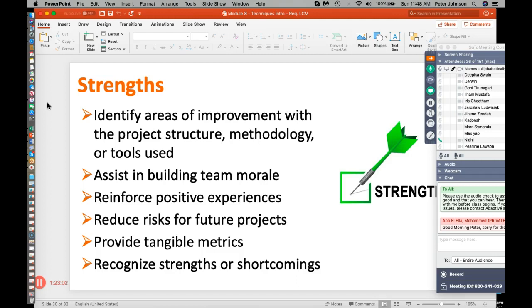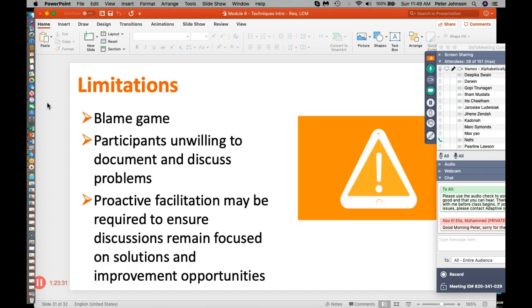The strength of doing lessons learned is that we're constantly trying to improve. We build it into our process. We make it in such a way that it doesn't resort to the blame game, so that it encourages more people to be more active and to offer more value. We try to base it on what are called tangible metrics, things that I can measure where I can see the level of improvement, but remember that sometimes they might be intangible or subjective kinds of measures. The blame game is a negative outcome. If all we do is get people to finger point at each other, then you're not going to be building morale. You're going to be destroying morale in that process, or inhibiting participation. So how lessons learned are conducted has a lot to do with not only the success of that particular session, but the ongoing success of being able to recommend changes.